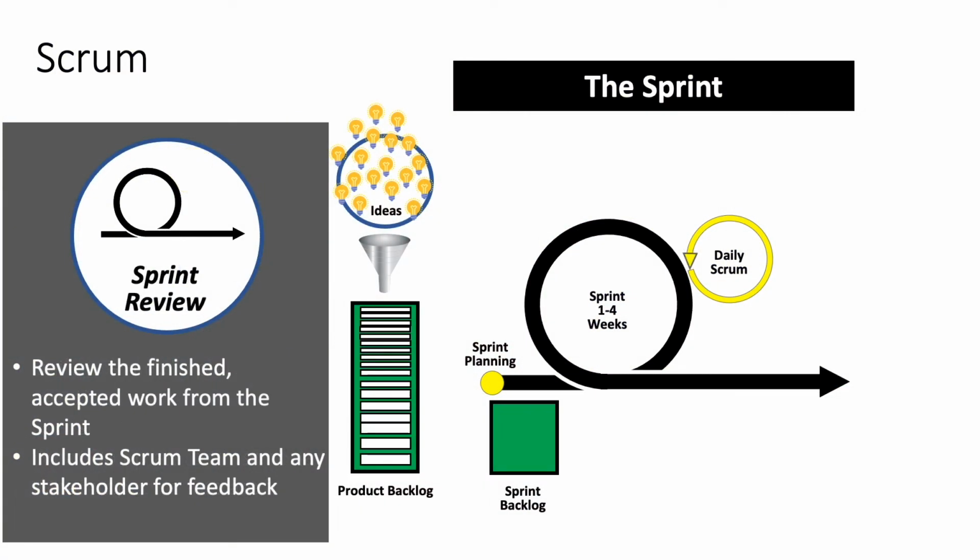As the sprint comes to an end, the team would have finished several user stories. The result of completing these stories is called a potentially releasable increment. They will discuss the finished work in a meeting called the sprint review. Often, the team will invite stakeholders and others to review the finished work together with all of the team members. This is a great opportunity to get feedback from people within the team as well as outside of the team.